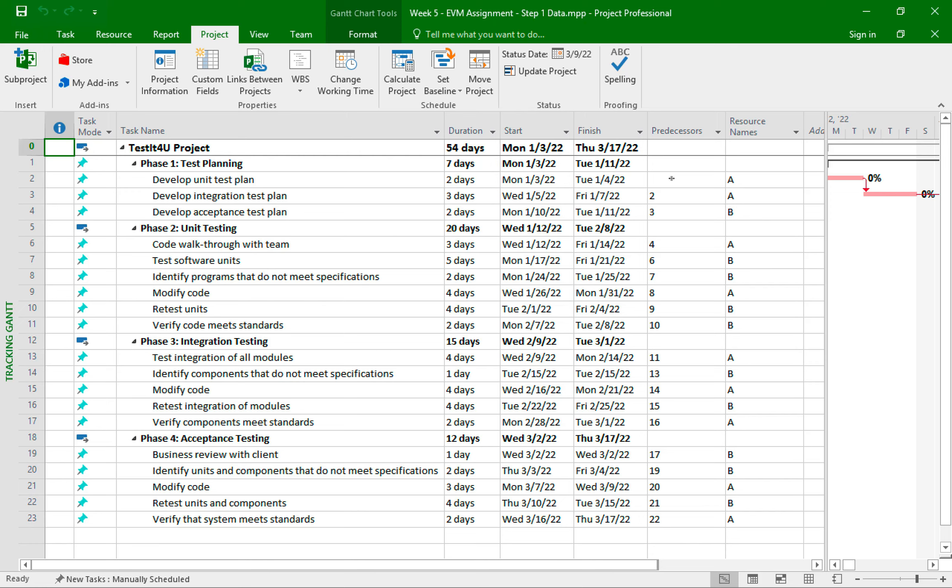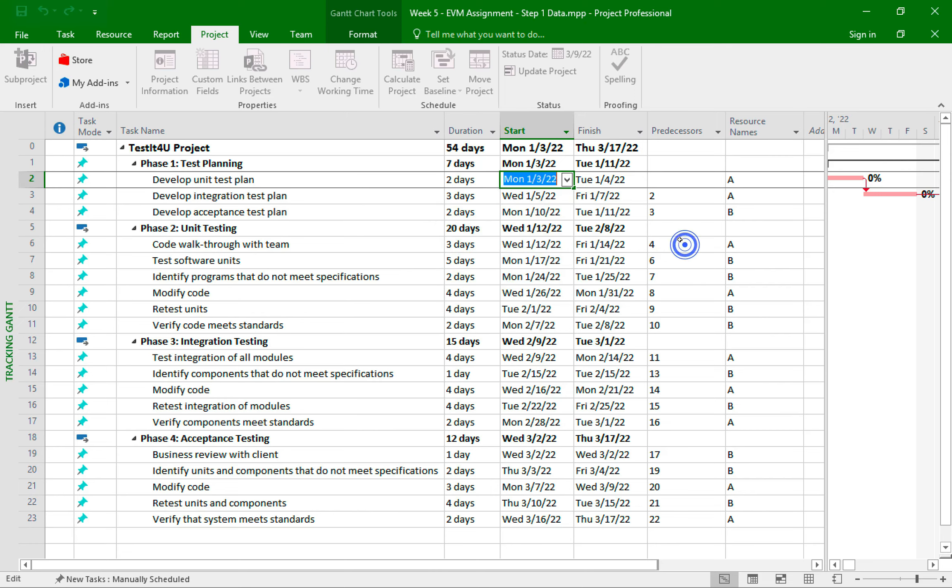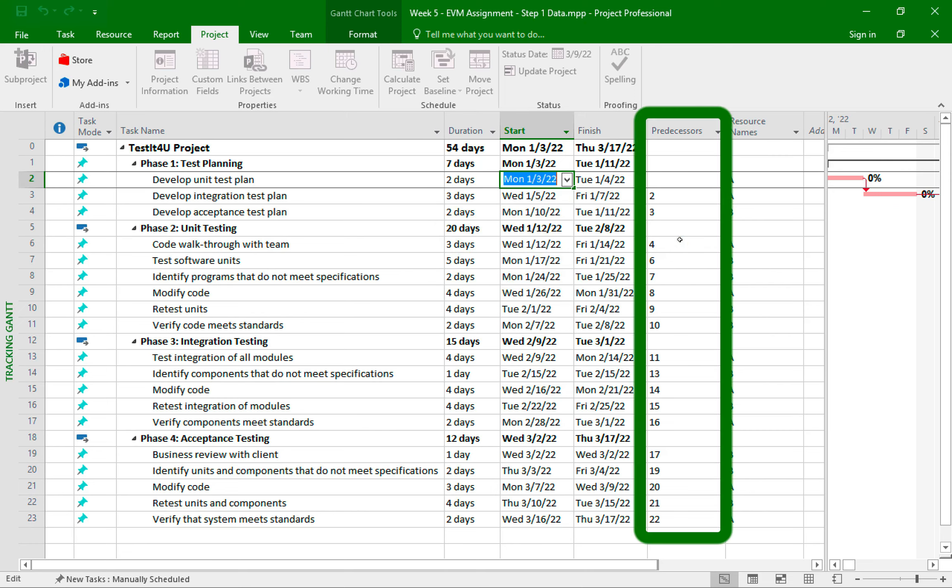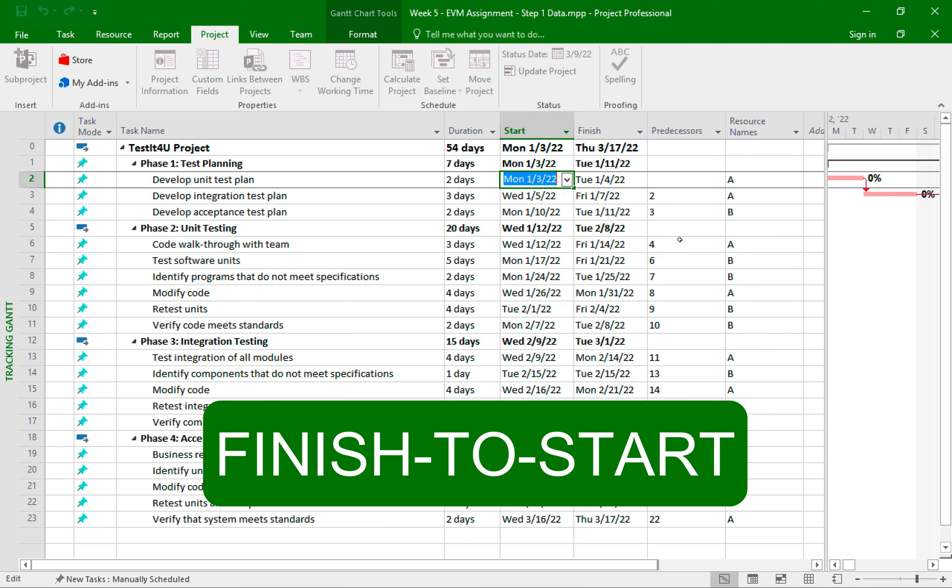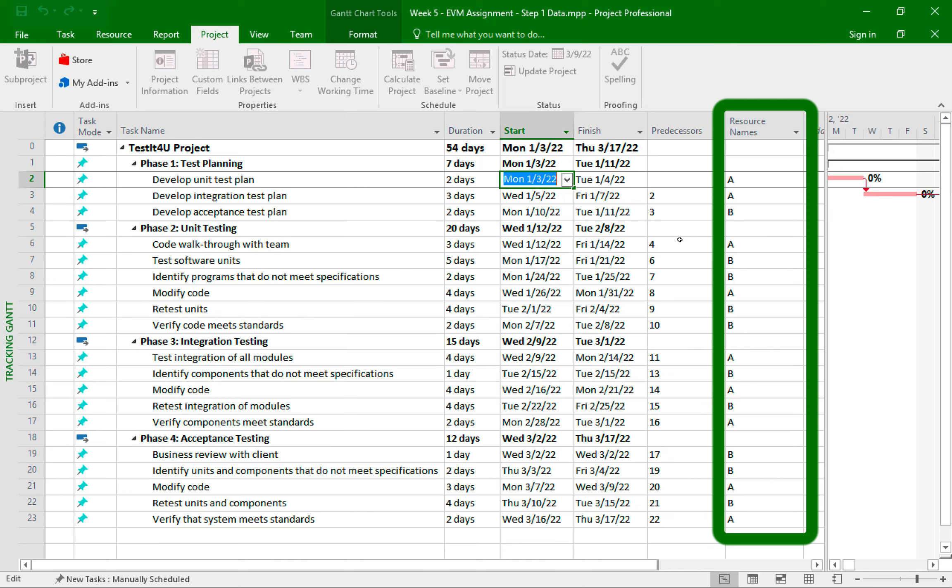In case you missed to set the date for the first Monday of the new year, you simply click on the pull-down arrow next to the date and choose the date from this calendar interface. I also added the predecessors per the instructions, so each task must finish for the next one to start, which is the finish to start relationship. And finally, I added the resources to each task.